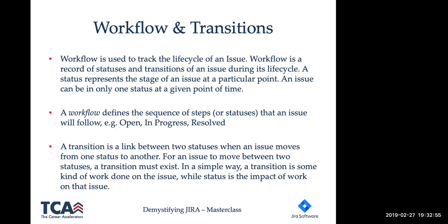So workflows and transitions are really key when it comes to using JIRA, because depending on the project you're working on and the type of project, you would need to define the workflows and the transitions to ensure that people adhere to a particular way or a particular sequence of steps. So the last thing you want is for someone to move a story straight from maybe open to resolved without it going through in progress. So when you have the workflow, it forces people to do the right thing. It enforces a level of governance within the project.